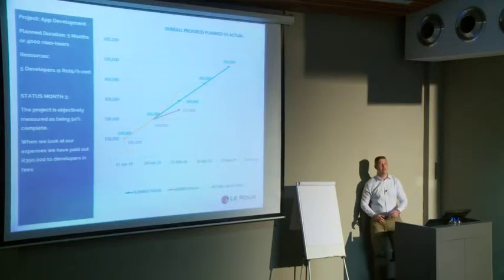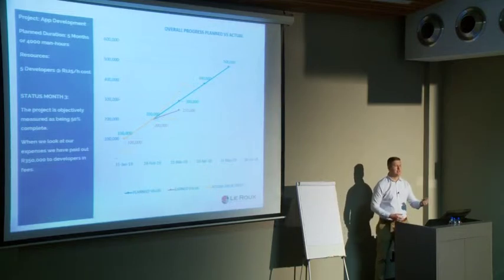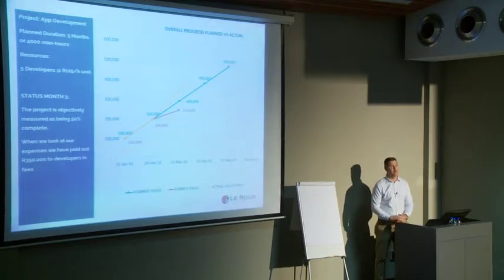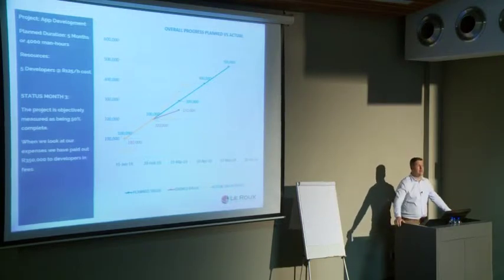We're not sure. Agree? We don't really know. Because somebody has given us the 50%, and let's say that is objective. It means irrespective of what these guys have spent, they could have spent 1,000 hours perhaps on this project in that last month. So they could have spent much more than what we've planned for. It doesn't matter, because what have we earned for that effort? You agree we've only earned 50%, we've only earned the 250.